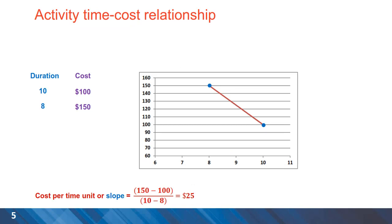Important concept in here is the relationship between time and cost for different activities. An example activity with normal duration of 10 days with normal cost of $100 and then when the duration is reduced to 8 the cost is increased to $150. Because of overtime and dedication of more resources, we can calculate the slope for the two instances and the cost per time unit is calculated to be $25.